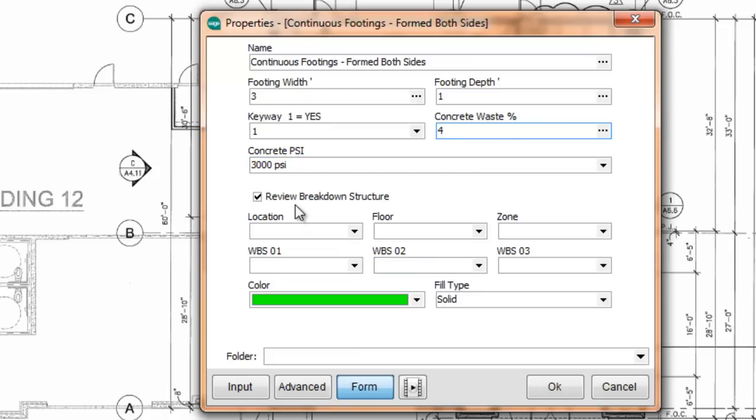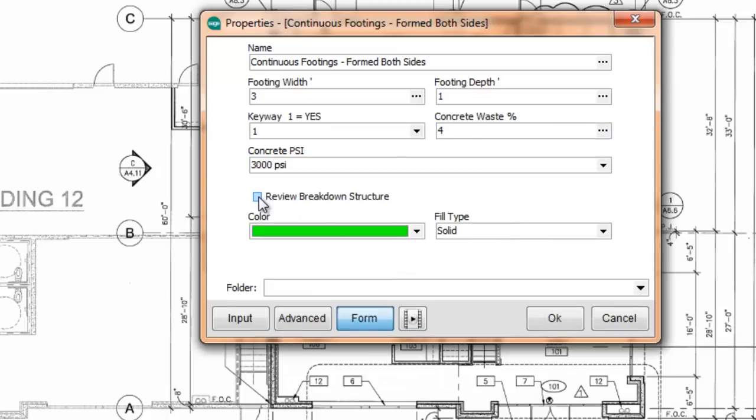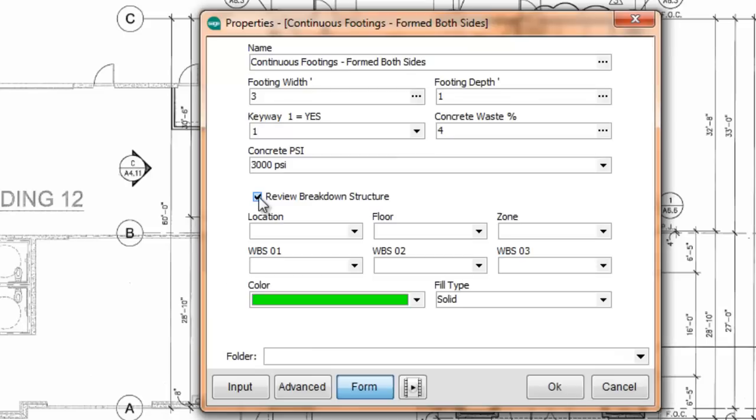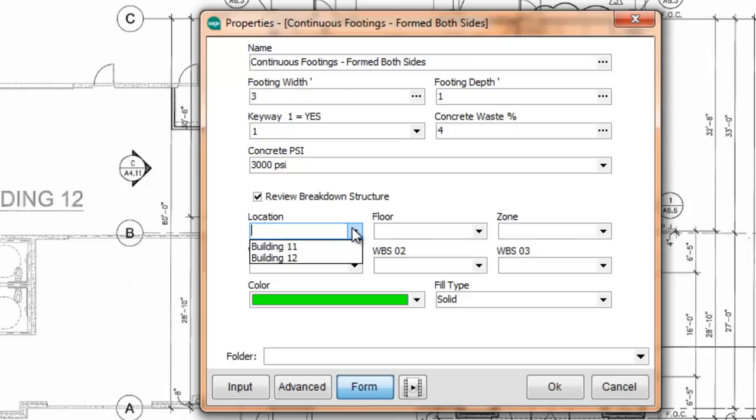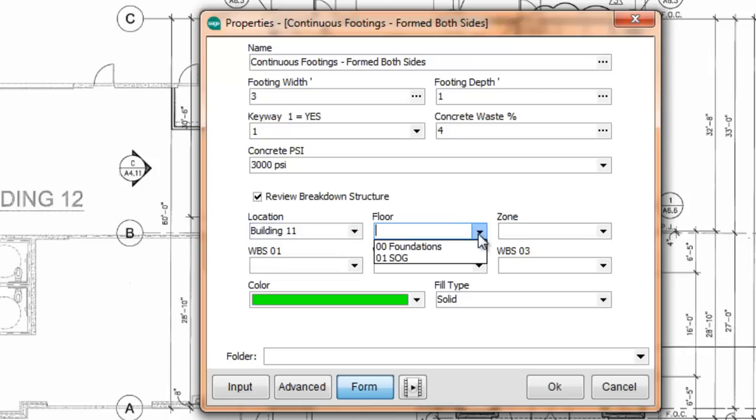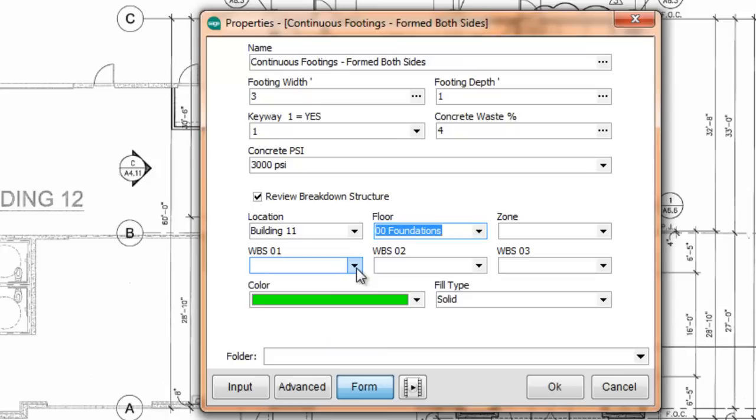At the lower side, you have the review breakdown structure which you can turn on and off. Here we put in the breakouts of how you want the project organized. So we can say this location belongs to building 11. It goes for 00 foundations on the floor. And this work will be on straight time.